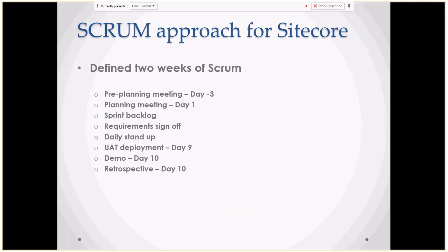So you get together with the build team, everyone, and plan the estimation. And then, as I said, you would know the team capacity, and then you accept a certain number of stories that you can deliver within the sprint. So that happens in the planning meeting. Sprint backlog is what you agreed to deliver within the sprint. So from the product backlog, we will prioritize and get certain stories to deliver within the iteration, within the sprint. That is what we call the sprint backlog.